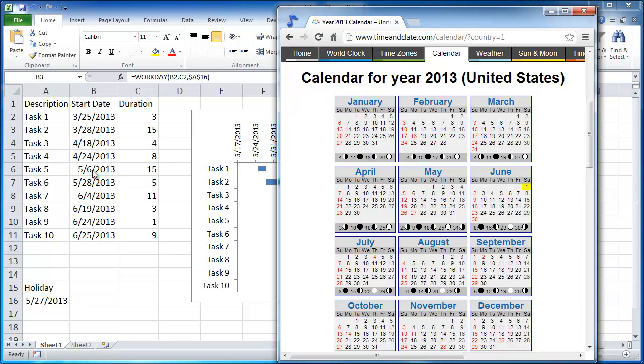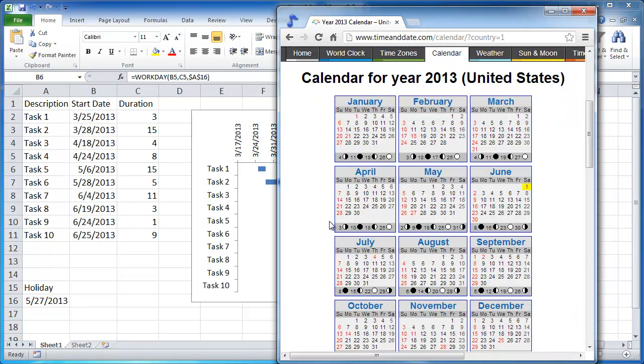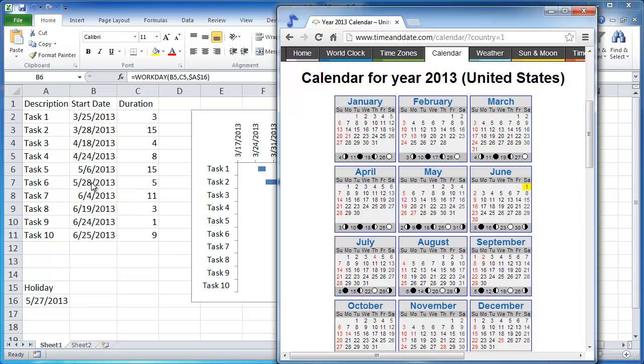So here we have task 5 and it takes 15 days. 5/6 would be here. So we have 1, 2, 3, 4, 5, 6, 7, 8, 9, 10, 11, 12, 13, 14, 15. So the 15th day is on the 24th. You can see here, the next task starts on the 28th. So what happens is it did not include the weekend, the 25th and 26th, and it didn't include the holiday the 27th. And it started the next task on the 28th. So that is how you would create it in a formula to supply the chart elements here for the Gantt chart.